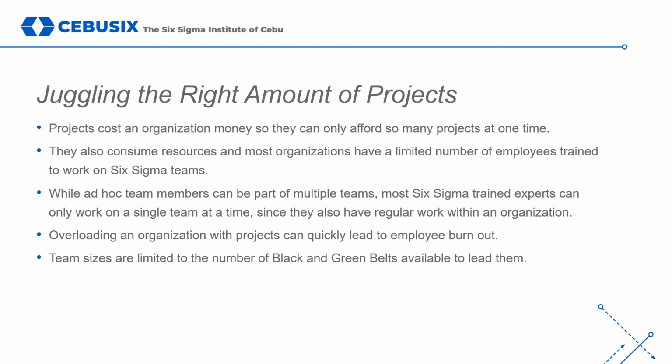Companies shouldn't launch 3 projects at one time that draw heavily on IT resources, or attempt multiple simultaneous projects that need input from the Director of Compliance on a regular basis. Relying too heavily on resources for multiple projects can burn employees out, decrease morale, impact quality, and impede work that is necessary to keep the business running from day to day.